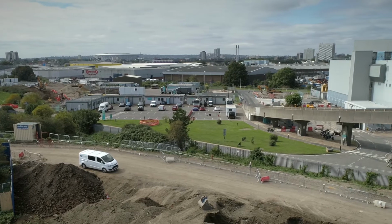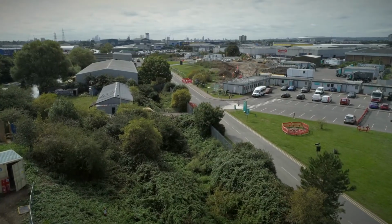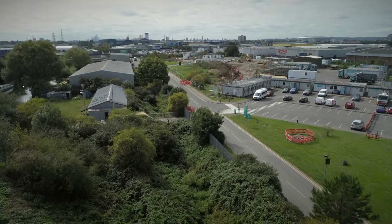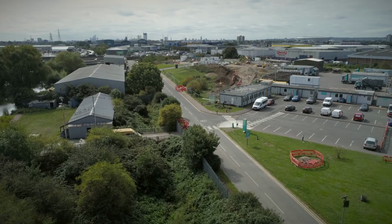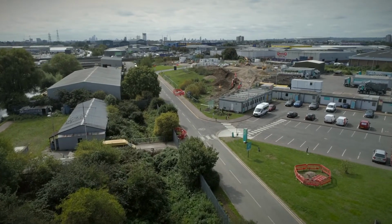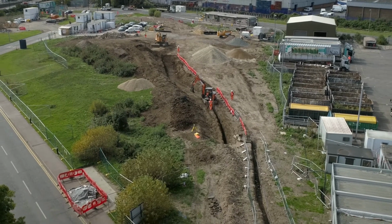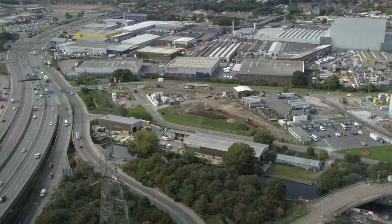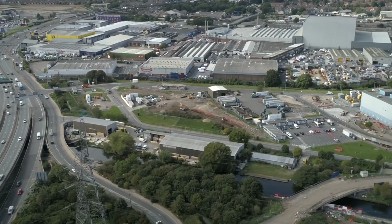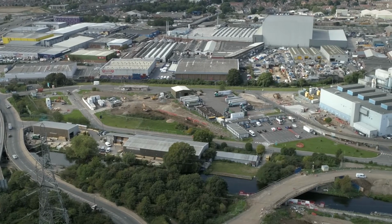More recently on site we are currently well underway on the Eastern Road diversion, which is part of the enabling works to allow Barhale to continue with their manholes B and C. The works that we are currently undertaking on the Eastern Road will involve a mixing process to install a hard standing slab, again minimising the amount of vehicle movements throughout. We are currently well on programme for Barhale to mobilise on site in October and continue the main works.